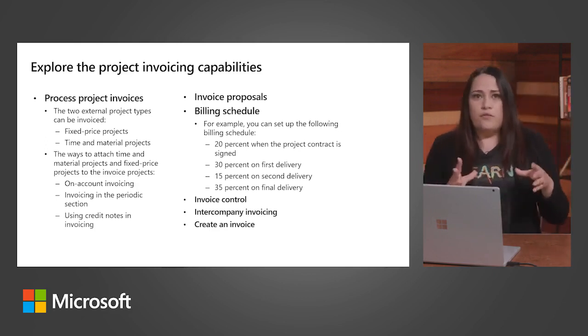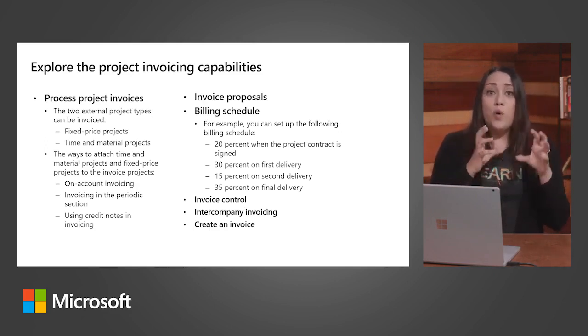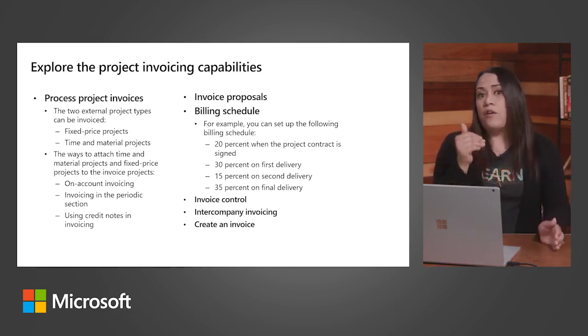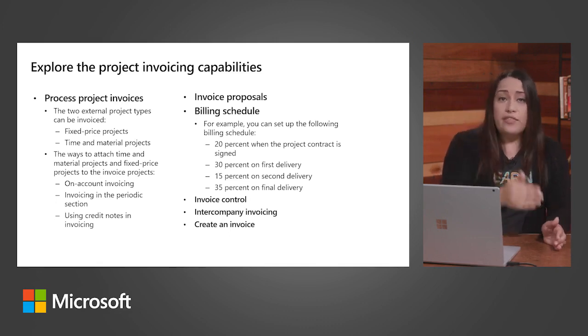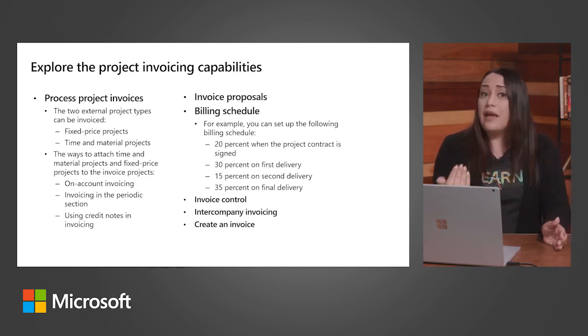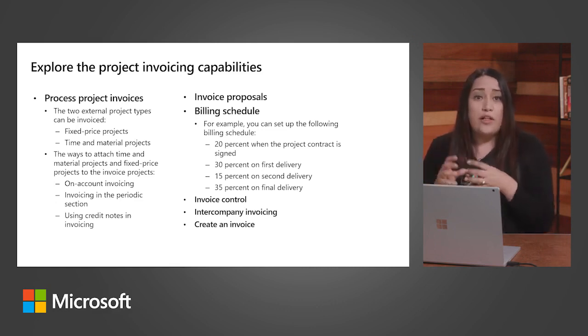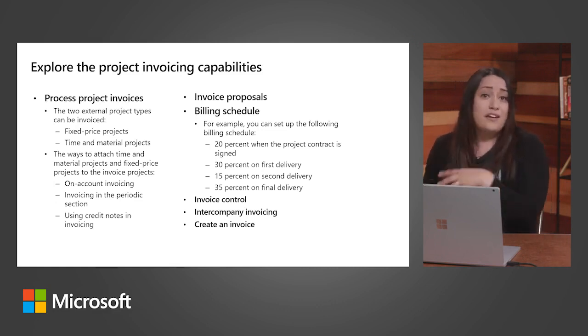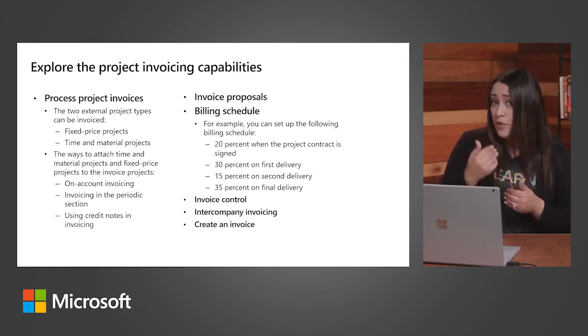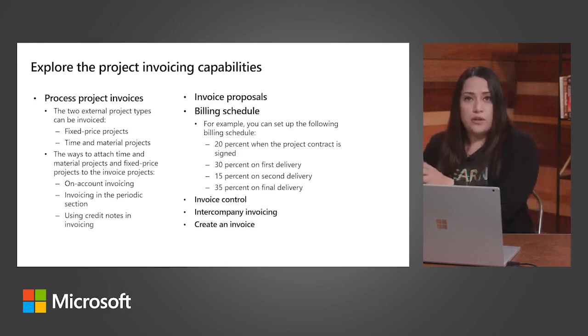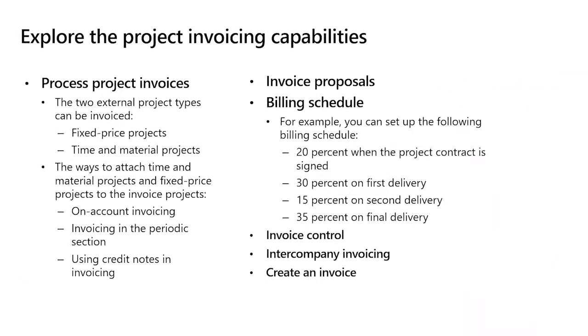So think of it like this. You create an invoice and they had to pay 20% of the total cost of the project up front as a deposit. But then you're creating an invoice for that halfway point, and now they have to pay 30%. Then at the end of the project, they have to pay the remaining balance on delivery. So you can use the invoice to control and track both invoiced and non-invoiced transactions. And you can use that to analyze all of the different transactions against the quotes, and it gives you a bird's eye view of your projects from the quote stage to the completion.